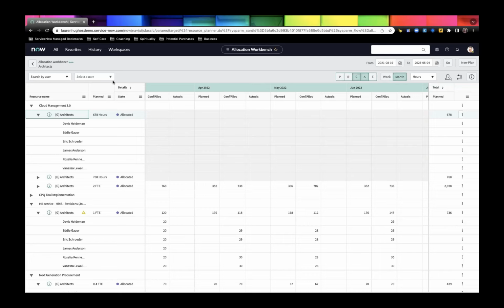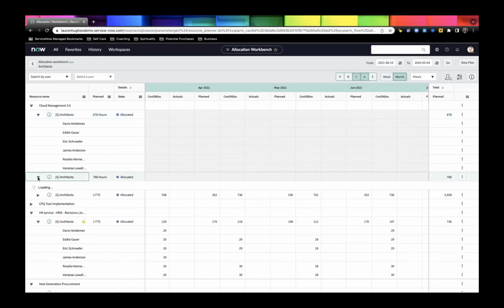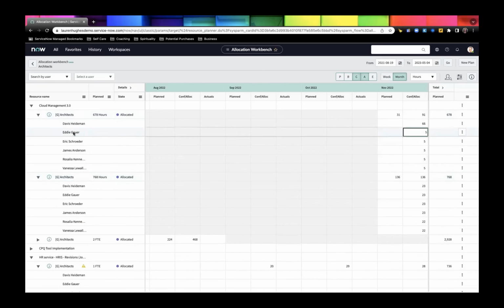Yeah, Lauren, Luis here. Just, there's two things. You have capacity and availability. They're a little bit different. So capacity, my total capacity, like I work 8 hours per day. And then you have your availabilities, how many hours I'm available. So if you enter time off time, 2 hours tomorrow, for example, then your availability will be 6 hours. So indeed, to do allocation, I will look to the availability, how many hours are still available for that person to take a new work.